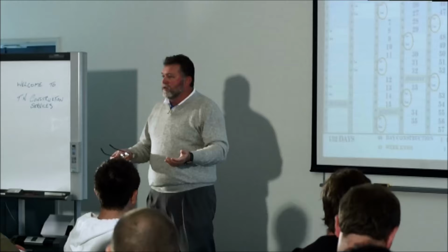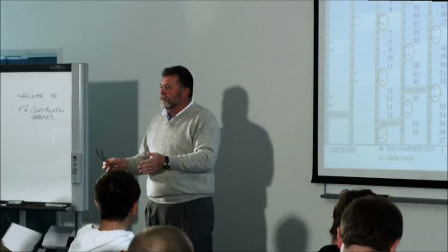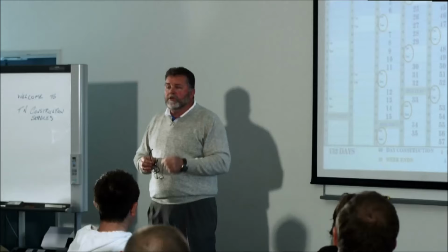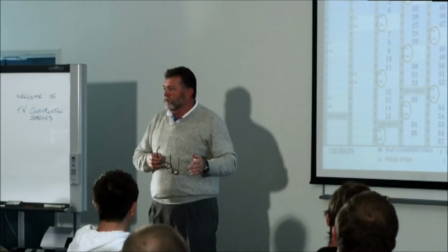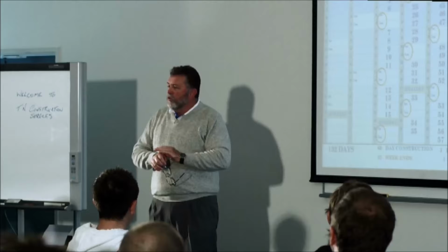You're not going to know. Do it in 2-week blocks if you have to. Do it for a month, whatever. When I was building commercial work, my contract simply stated that if there was 1 day of rain, it constituted 3 days of extension of time because I couldn't get back on the site. We had situations where we would be pumping footings out for 24 hours a day just to try and get concrete in the ground.